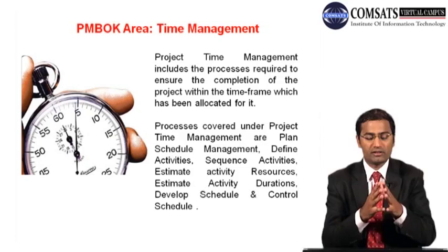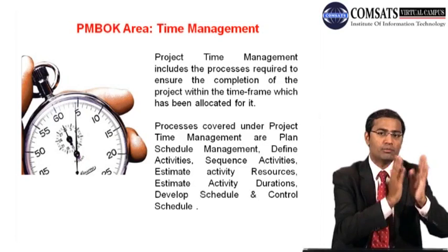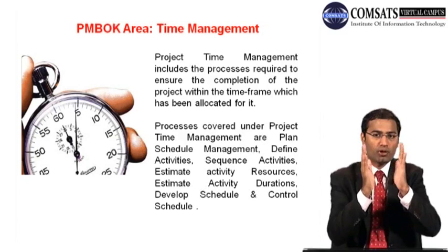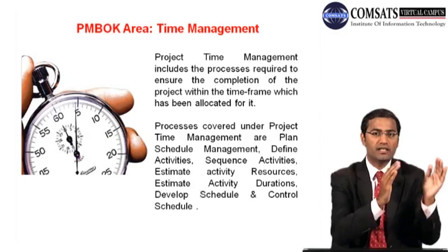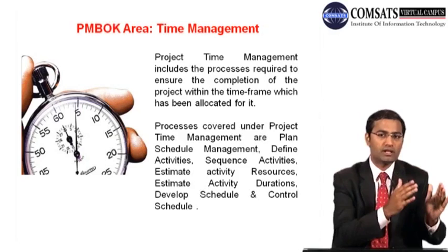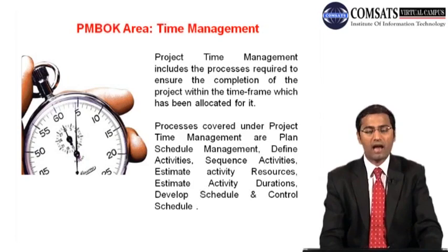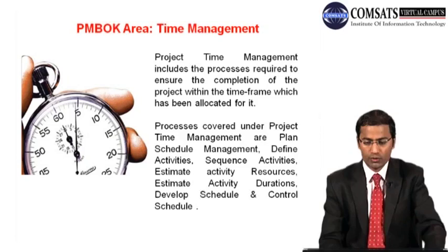So when you have your work breakdown structure with you, and the work breakdown structure is dividing the project into manageable work elements. The project is divided into phases, phases are divided into control accounts, and control accounts are divided into work packages and planning packages. This hierarchical structure, which we are going to discuss in detail, is further divided into activities in time management. So we define the activities.